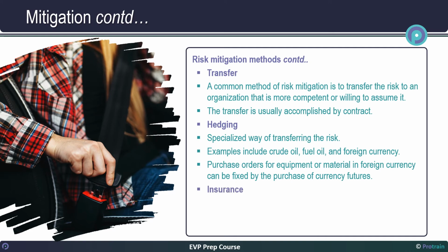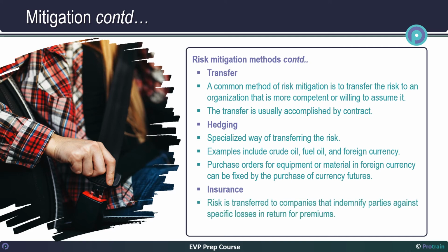Insurance is a well-known risk mitigation method. In this method, part of the risk is transferred to companies that indemnify parties against specific losses in return for premiums.